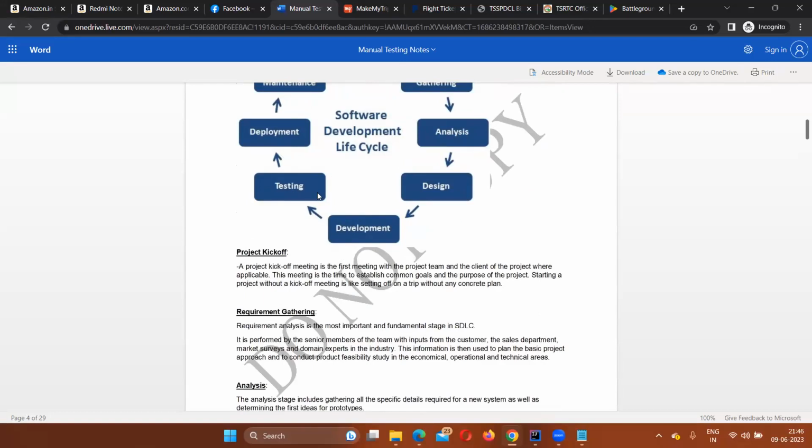Is it possible to accommodate new requirements in your waterfall model? Right when you are in the middle of your project, is it possible to accommodate new requirements? Not possible. Exactly. So that is why in your incremental iterative model, if there are any new requirements coming up ad hoc, I mean immediately by the client, you don't say no to the client. You don't stop your project. You don't stop your work in the incremental iterative model.